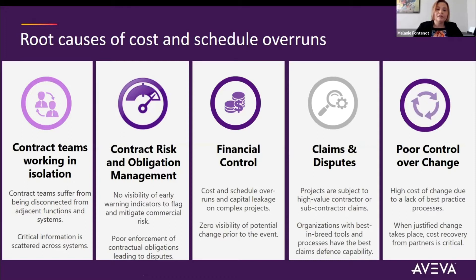With financial control, we've seen that contracting teams don't have much access beyond their ERP, yet they are responsible for reporting what's in the pipeline. We can show things that are potential and pending — including change orders and invoices to be paid. We have a system that is completely auditable, everything is time-stamped and user-stamped with very high security, making it a hundred times easier to dispute a claim. When contractors use the portal, they can see where decisions have been made and all the data is right there — avoiding the claim before it even arises.